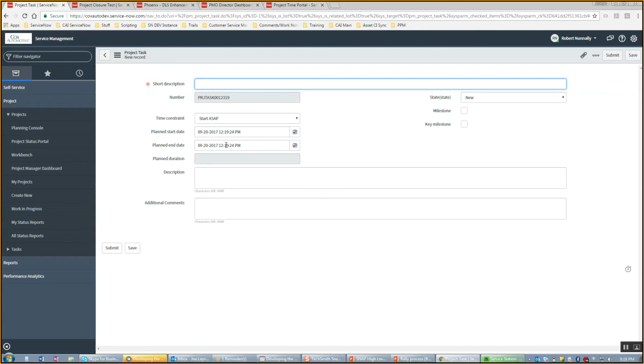The one thing Gail and I want to very specifically call out is the power of creating a task. You need to be careful with the planned start and end dates for your tasks, because they can drive the overall dates for your project. For example, if I choose a task to only go through a certain duration, I need to be careful that it did not update my planned end dates.